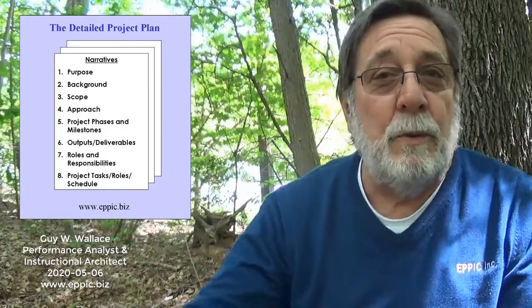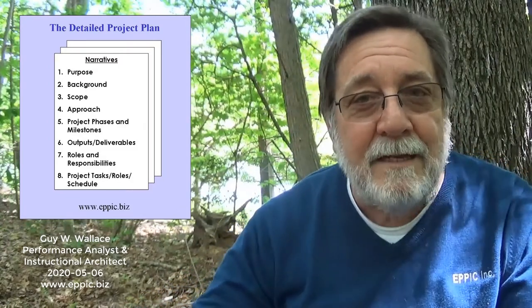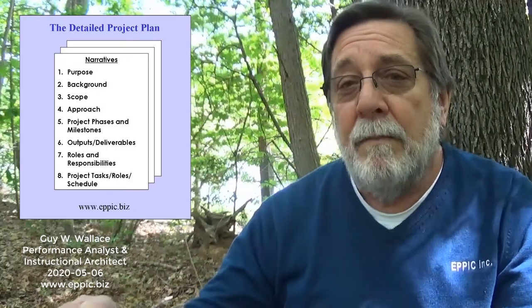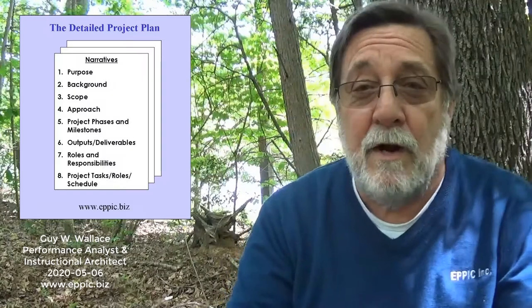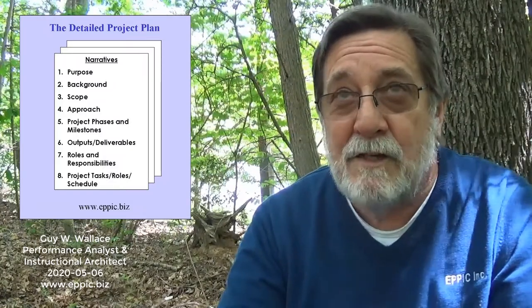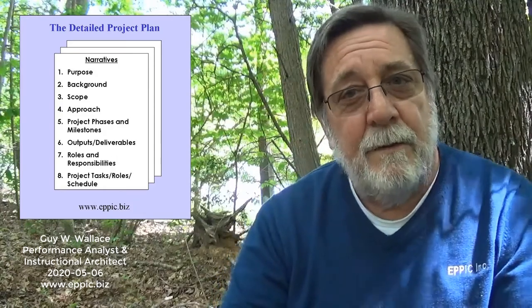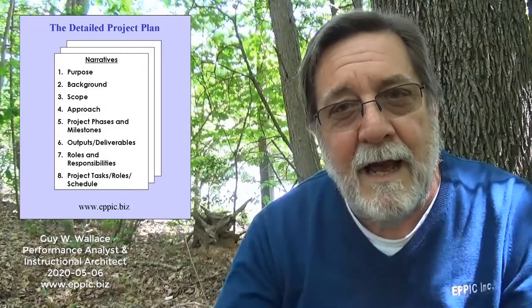And if you want to, we can do the project plan and proposal using that time and expense cost, but then we don't really know. But my alternative is to add 20%, sometimes 15%, but usually 20% to that time and expense estimate and declare that as the fixed fee price. So then all of the risk is on my part and not on theirs.